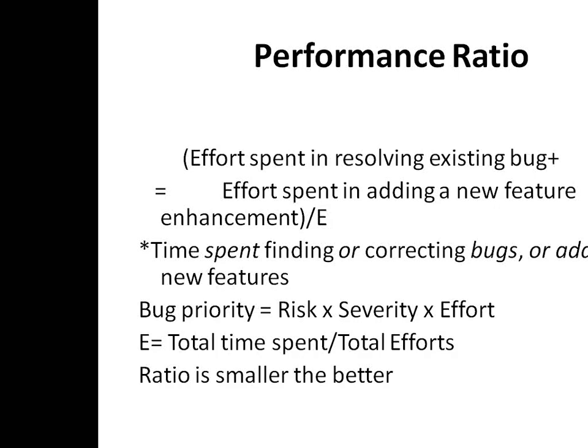Then the market dynamics are such nowadays that the client keeps on changing his requirement every month. It can happen. See, the client is paying you. If he changes the requirement, if he adds a new requirement, you cannot say my software or my project is not extensible, or I cannot add a new feature. So a lot of time or effort is spent, in terms of man hours, in finding a bug, correcting an existing bug or adding new features. So total efforts in these two things, bug correction and addition of features, divided by the total actual effort.